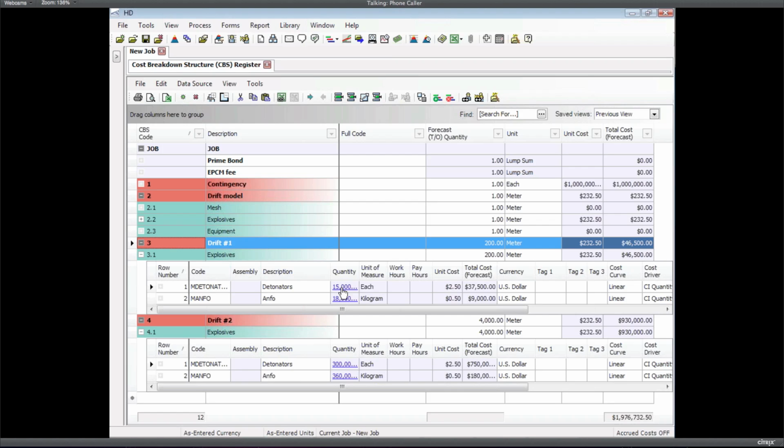So the question came up, if the waste factor was going to be different for drift 1 versus drift 2, how would you handle that? The way I've seen customers handle that in their performance spreadsheets is you're going to have different types of performance based on different types of drifts. It might be a C-type drift or a D-type drift, so different parameters of the drift. Right? You might have 3 or 4 or 10 different types in a project. So in that case, you'd have one of those spreadsheets for each type. So you'd link to a different spreadsheet. You'd link to a different cell. Yep.